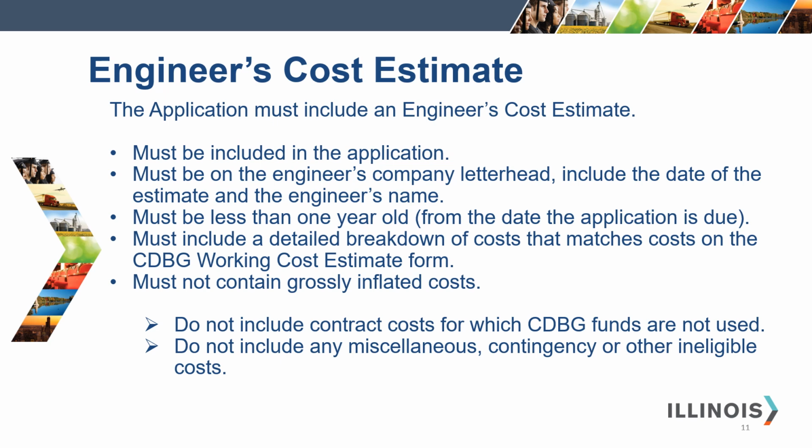The engineer's cost estimate must contain a detailed breakdown of costs. The engineer's cost estimate must match the CDBG working cost estimate. Do not include any contract costs for which CDBG funds are not used. Do not include any miscellaneous, contingency, or other ineligible costs. Cost must not be grossly inflated.